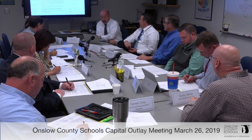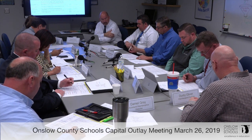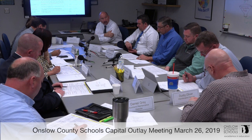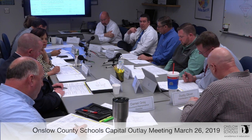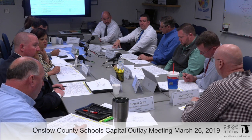Yeah. All right, and then heat pumps for the 700 building. Now, I know in the capital improvement plan, it was a long-term projection, year 6 through 10. If funding was available, they're in pretty bad shape. What we're doing now is just replacing them as we can. When something fails, we go replace instead of replacing in mass.